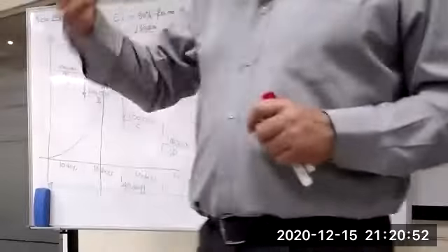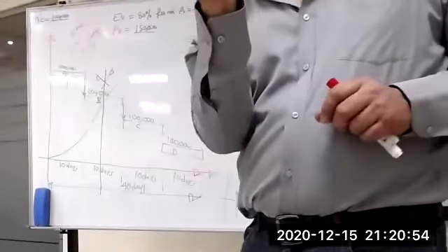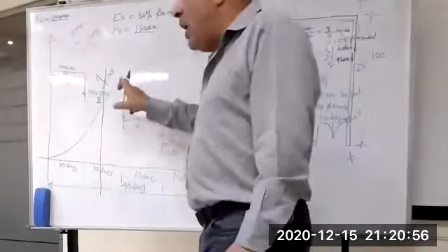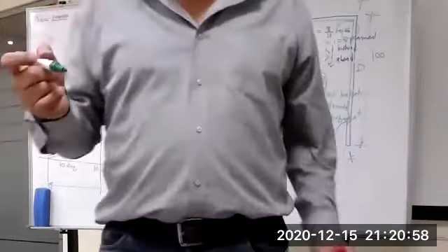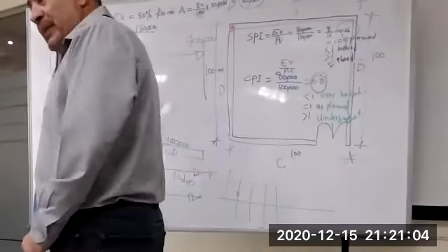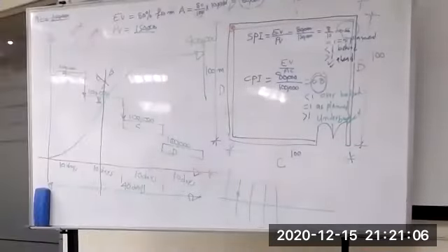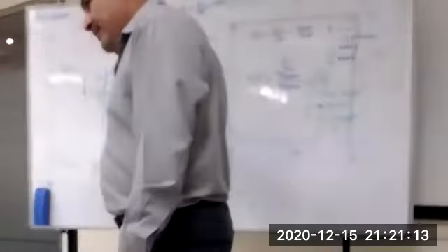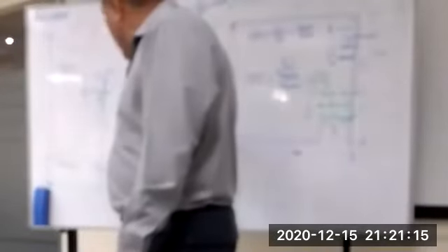Now you need to take action. First, you have to define the root cause. When you found out, you asked your supervisor, and the supervisor told you, sir, I already allocated labor, but it's not that skilled. Assume it happened. Okay, I will update you after 5 days, in the next 5 days here, but take this action.